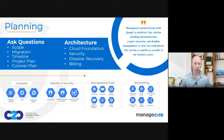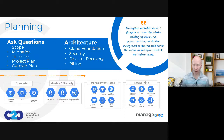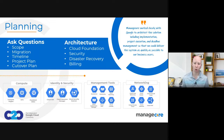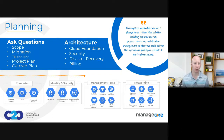As we assess the scope, we also want to start putting together a timeline. The timeline is dictated by the level of effort and how long it takes to complete the project, but there may also be business drivers. In most cases for migrations, you'll do the move in multiple phases — sandbox systems first, followed by development, quality, a mock production run, and finally your production cutover. As you develop your scope and timeline, that feeds into a project plan, and ultimately you want to develop a runbook or cutover plan that you would follow in your production go-live.